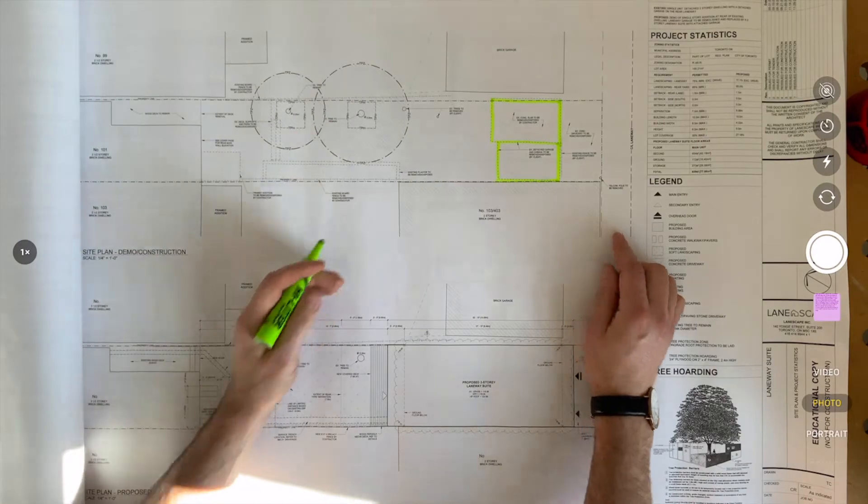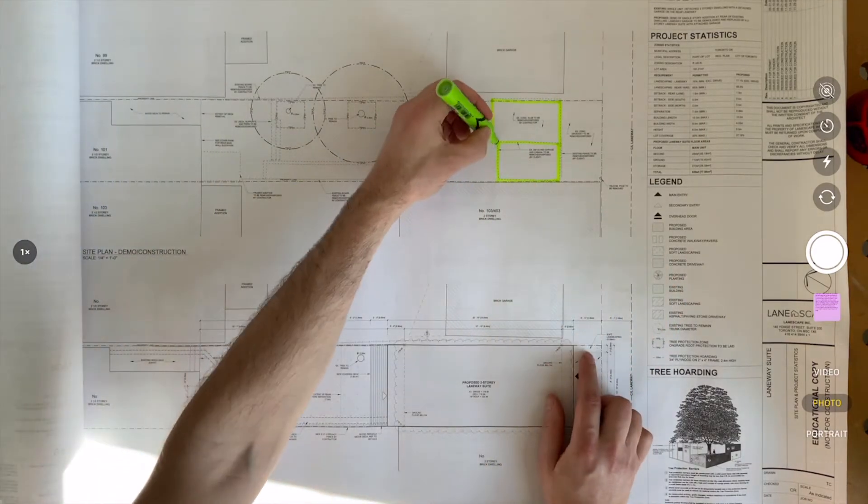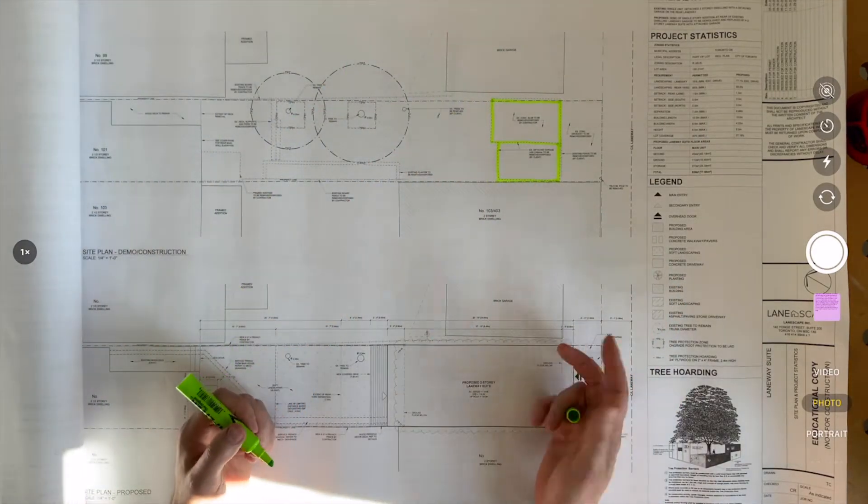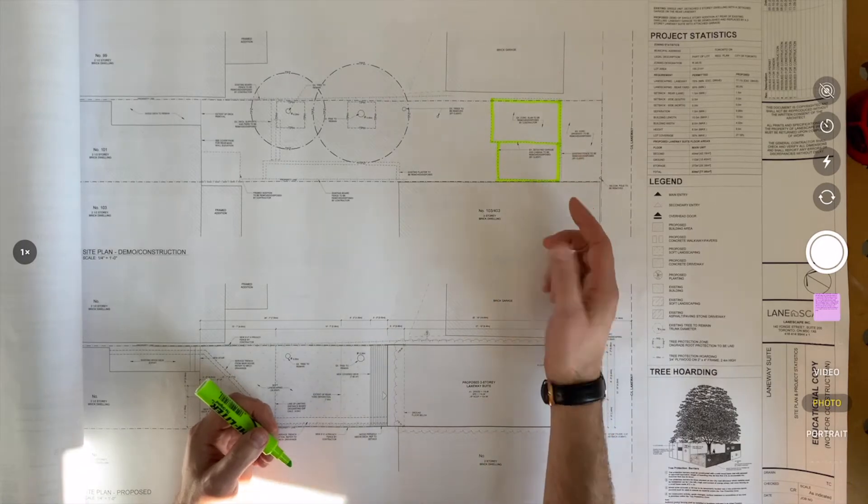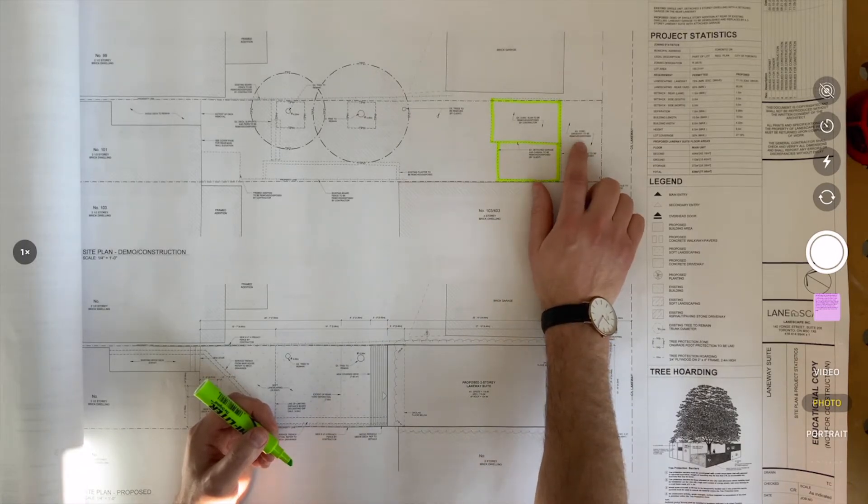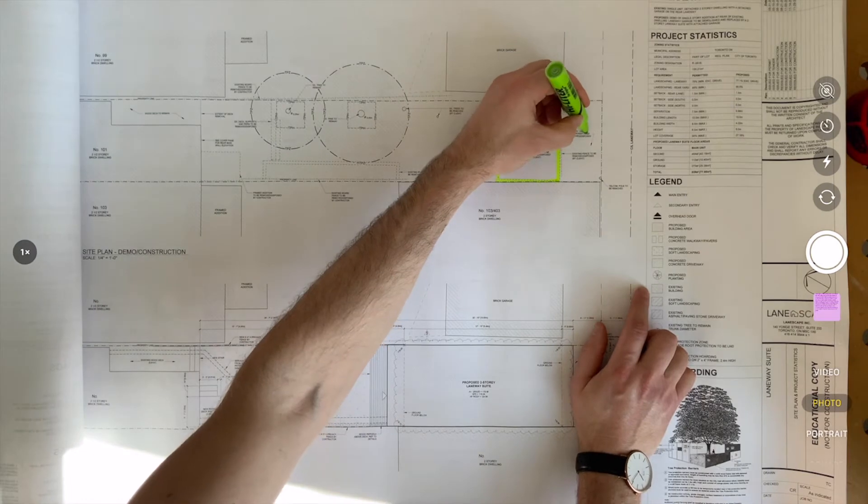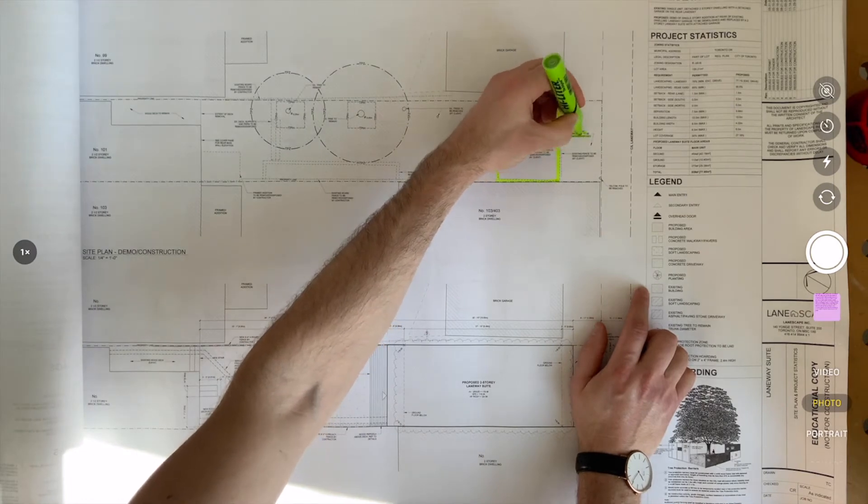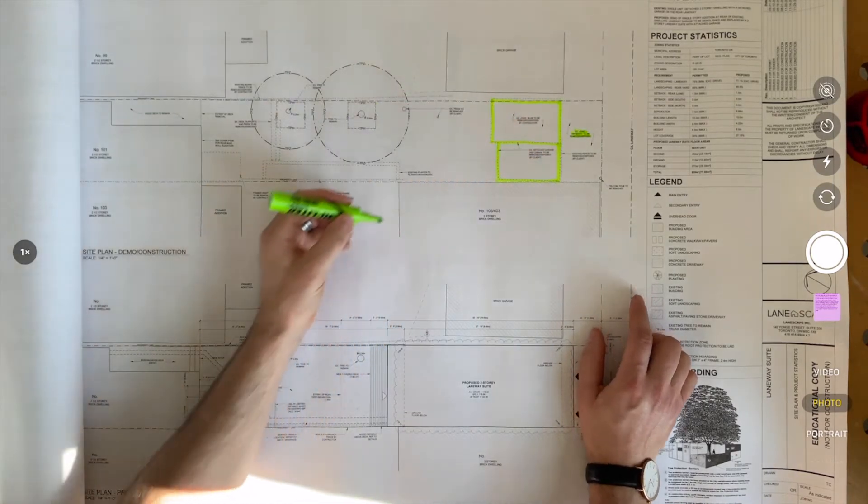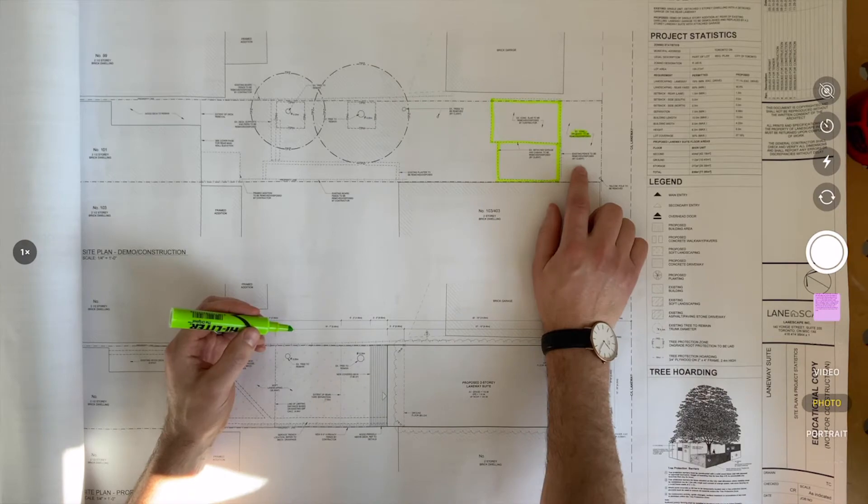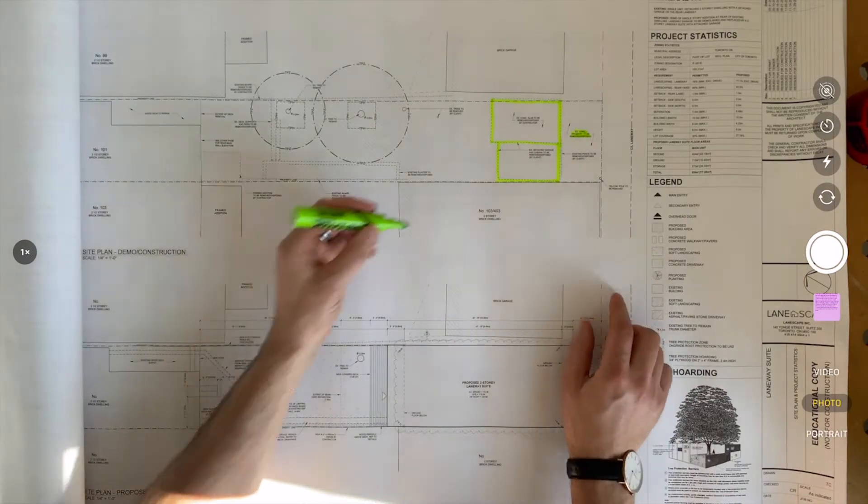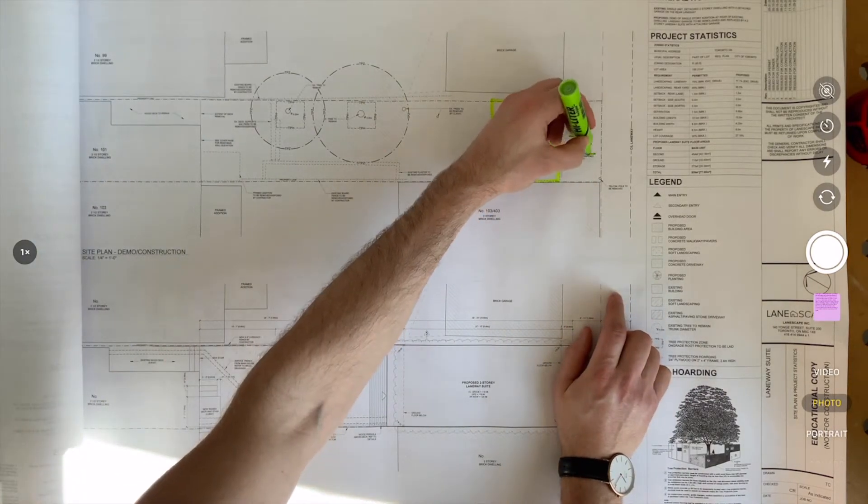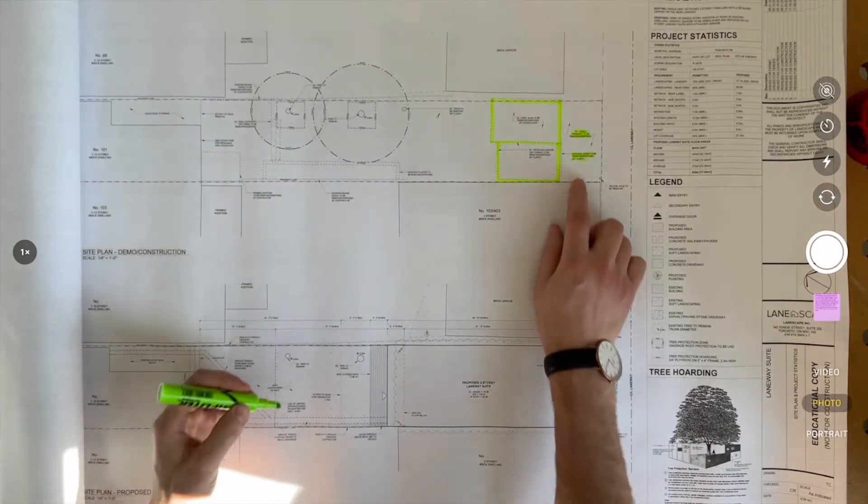So when I get to my section on site prep or removal, I can do that. I want to read all my notes. Existing concrete driveway to be removed – that is me because I am the contractor for this project. Existing fence to be removed and disposed – that's also me. So I'm going to write that under my removal scope.